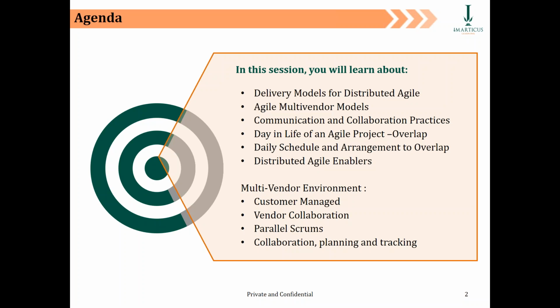So that's a very important topic because these days, guys, the majority of projects are multi-vendor. Obviously, gone are the days when clients used to award very large projects to a single vendor, which means today they don't want to keep all the eggs in one basket. So they prefer allocating either the different phases of the project, or they break the project into different efforts, and they allocate one chunk of effort to each vendor.